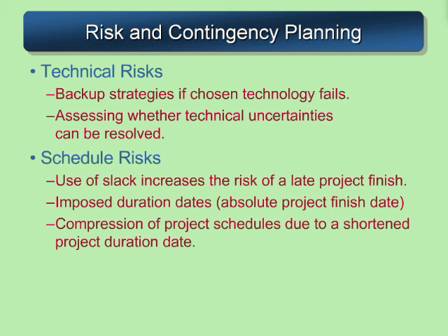But keep in mind that anytime we compress the project schedule to shorten up project time, we can actually increase the risk of actually being late. And we'll see that more when we get into Chapter 9.